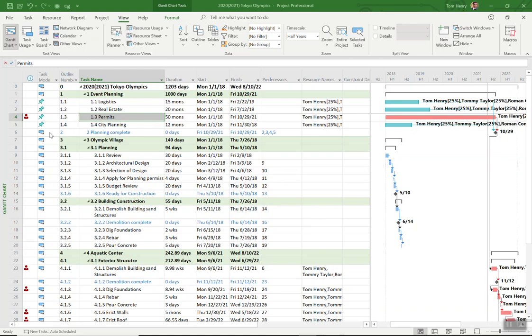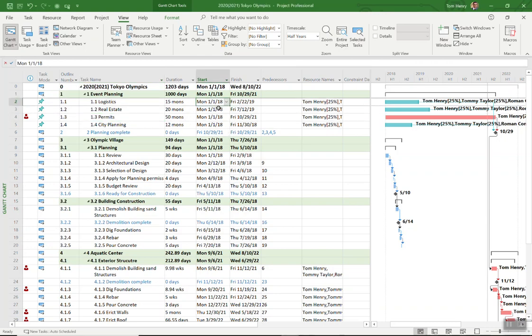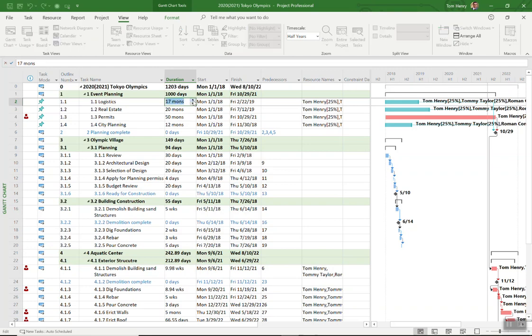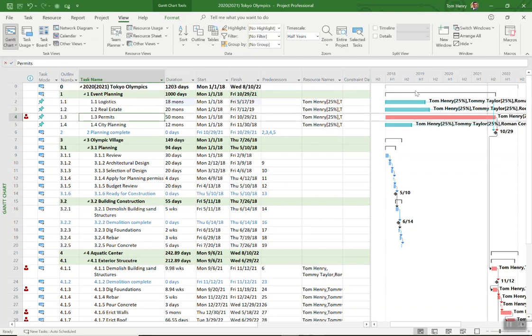With auto scheduled tasks you've essentially turned on the Microsoft Project scheduling engine and Microsoft Project will be in charge of controlling the dates and updating the tasks for you. So don't use them. Why not? Well if you were to come in here and push out a task say it's 18 months you see nothing happens, it doesn't really push any other task out.